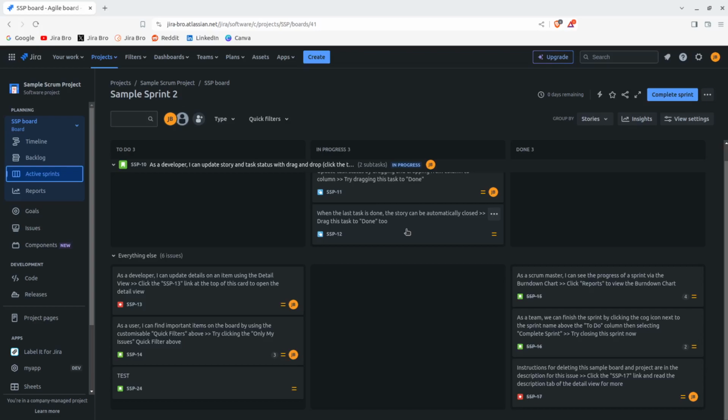So, when it comes to the demos, where your Scrum team is presenting the feature to your client, and your client gives you the feedback, which is really important so the team knows what to work on. And that could automatically go to the sprint retrospective, because within the sprint retrospective, we're talking about 4 things: what went well, what didn't go well, are there any suggestions, and are there any questions?